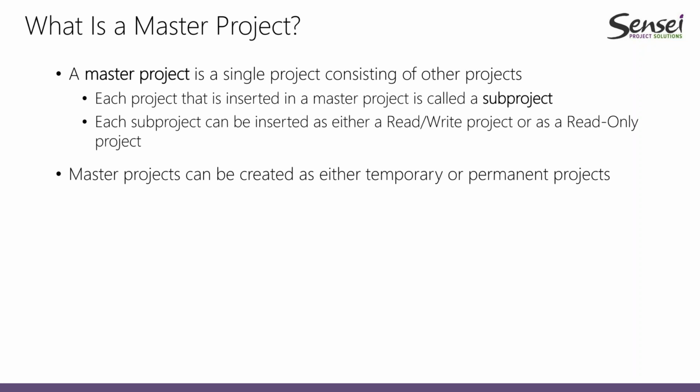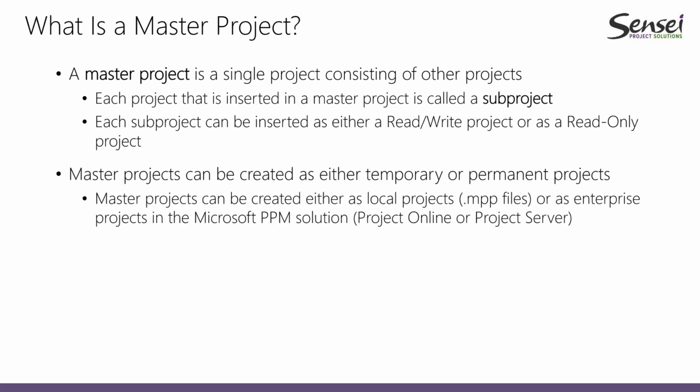Master projects can be created either as temporary projects or as permanent projects that you save and reuse. Master projects can also be created as either local projects where you save them as MPP files or as enterprise projects in the Microsoft PPM solution. That's Project Online or Project Server.